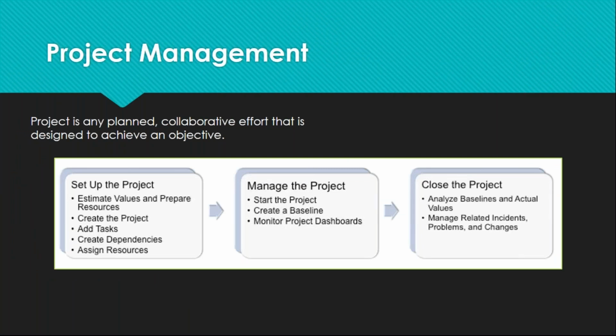So let's move on to project management. A project is any planned collaborative effort that is designed to achieve an objective. First, set up the project: estimate values and prepare resources, create the project, add tasks, create dependencies, assign resources.